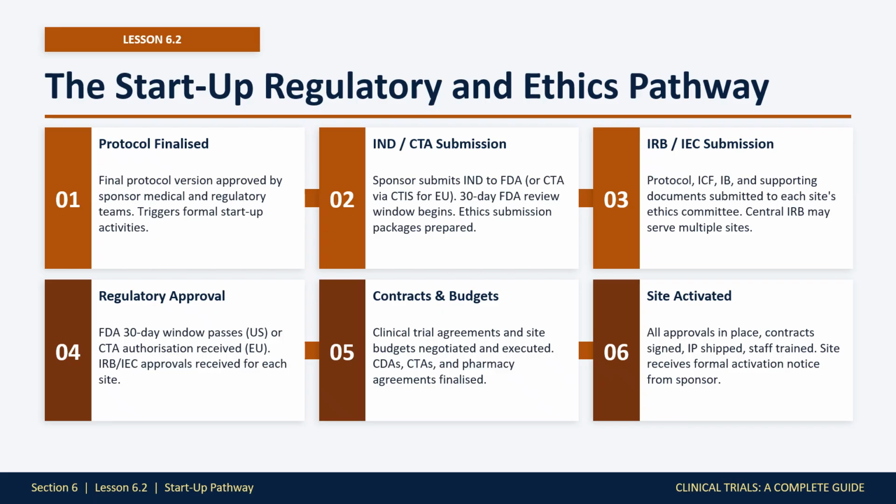Step 3. Protocol, informed consent form, investigator's brochure, and supporting documents are submitted to each site's IRB or IEC. In the United States, a central IRB can serve multiple sites simultaneously, significantly compressing this timeline.